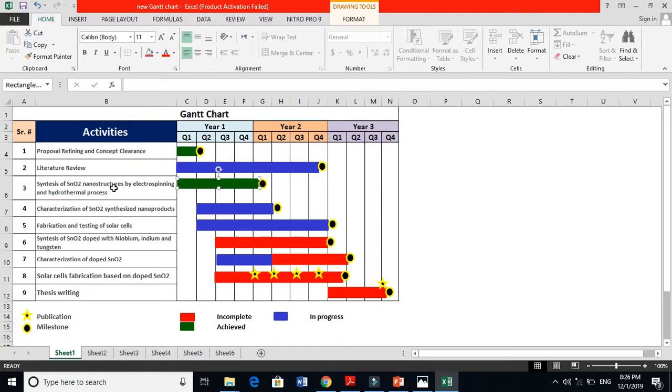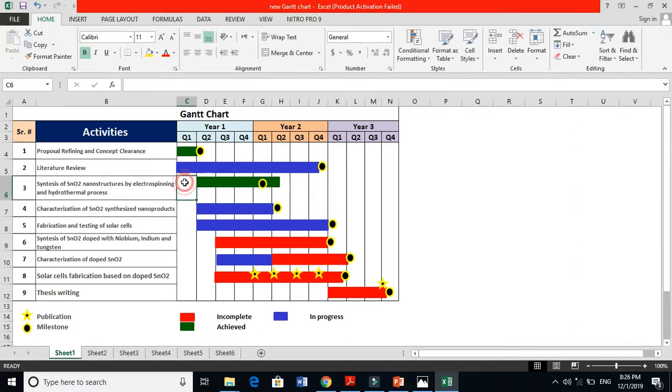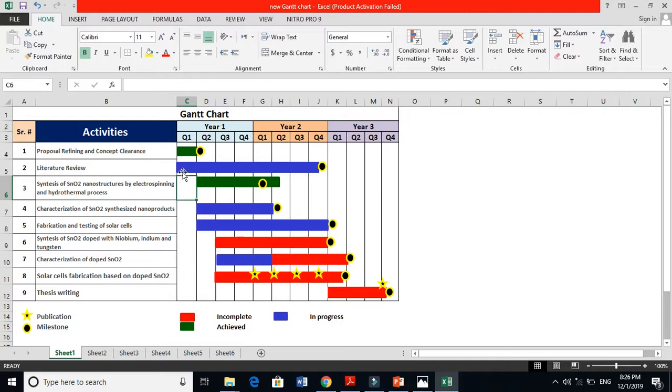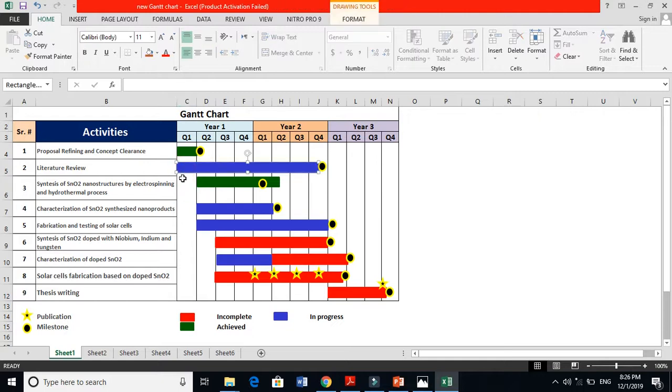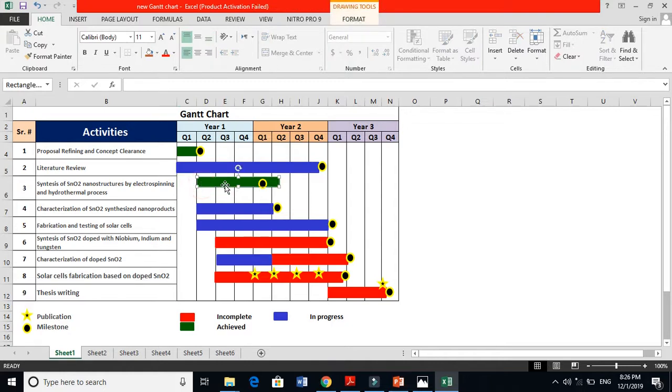During that time I'm also starting work on synthesizing SnO2 material by electrospinning and hydrothermal method. I think it should be like this a little bit, because I could not start directly from their synthesis because I did not know the material, I did not know what is electrospinning, I don't know what is hydrothermal, and I don't know how to synthesize. So this gap here I will clear my concept during this time, the first three months. After that I will start synthesizing this material. You see, these are my milestones.